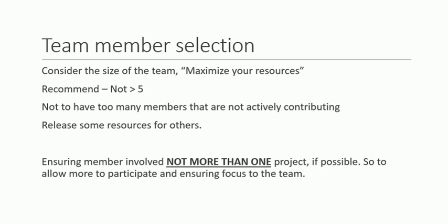But the problem is that when we are working on Six Sigma projects, most of the time a single member is involved in other jobs, and he is also involved in different projects. He is working on 2 or more different teams. So that creates problems for Six Sigma projects, and it creates delays in project completion. So the basic problem is that we have to assign people who are able to conduct that project in minimum time, so that the cost for the organization is saved.